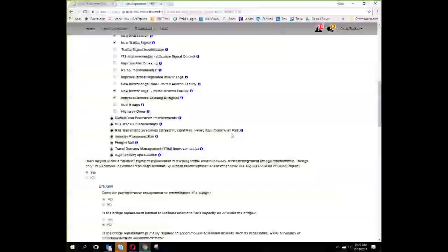But if an applicant did highway capacity analysis or a Synchro analysis, or worked with their respective MPO to have a modeling run done and just documented that in a technical memo, that would more than likely be sufficient. So say for a major widening, just show that you've looked at whether there are ways that you can enhance the existing capacity of the roadway before we go and add additional travel lanes.